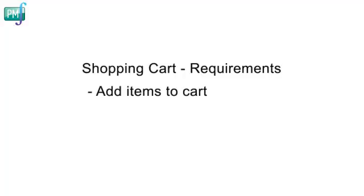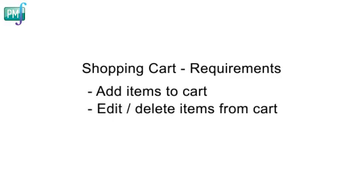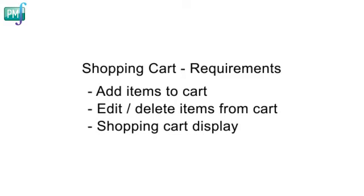Let's take, for example, the shopping cart feature. This is a large part of functionality that should be divided into smaller requirements. For instance, the option to add items to the shopping cart is one requirement, the option to edit or delete items from the shopping cart is another, how the shopping cart should be displayed on the screen with page layouts, buttons, and fields is a separate requirement, and the payment process is also a feature that should be defined independently. So I list the shopping cart requirements under a feature group called Purchasing Process. Each feature in this group will help the user to complete a small part of the purchasing process until the user can accomplish her business objective of buying the drapes.